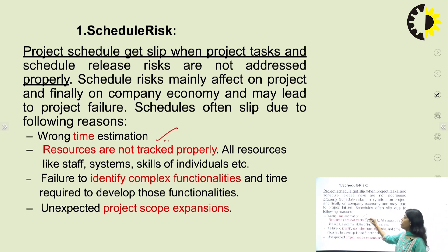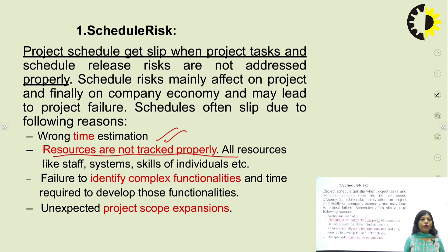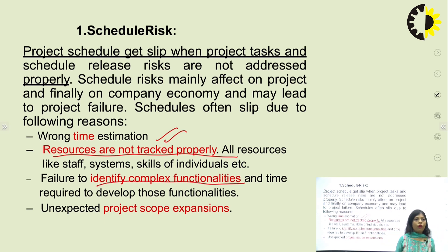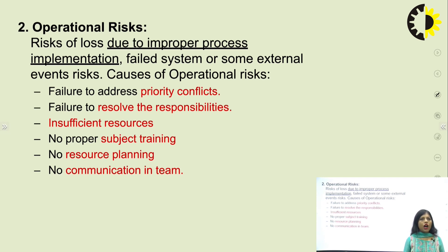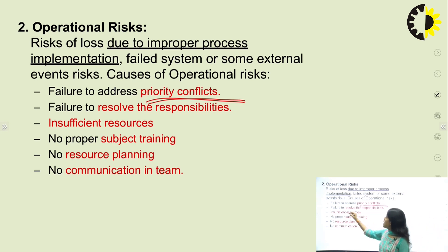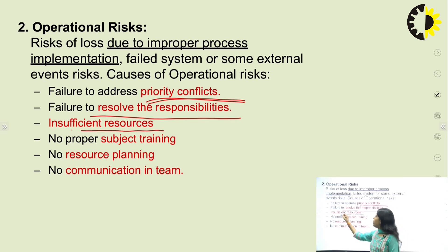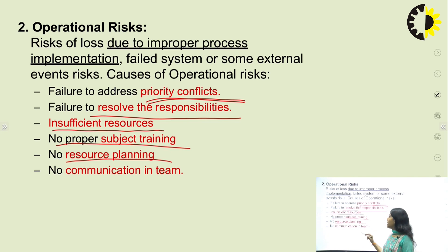Reasons for scheduled risk include wrong time estimation, resource problems, failure to identify complex functionalities and the time required to develop them, and unexpected project scope expansions. Operational risk is the risk of loss due to improper process implementation, failed systems, or external events. Reasons for operational risk include failure to address priority conflicts, failure to resolve responsibilities, insufficient resources, no proper subject training, no resource planning, and no communication in the team.